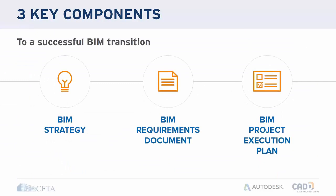There are really three key components of a set of BIM requirements. The first is an overall strategy, where you define your goals and objectives. The second is the BIM requirements document itself, which is the keystone — your central document that everything is built off of. The third is your BIM execution plan, which you use on a per-project basis.